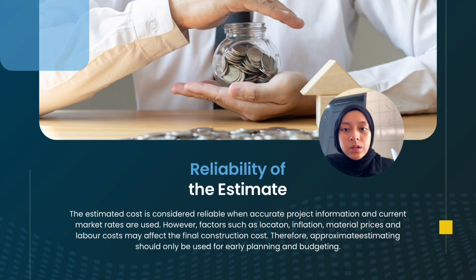Based on the calculation, the estimated cost can be considered reasonably reliable for the early planning process. However, it is still only an approximate estimate. So factors such as inflation, changes in material prices, labor costs, and project location may increase or reduce the final construction cost.